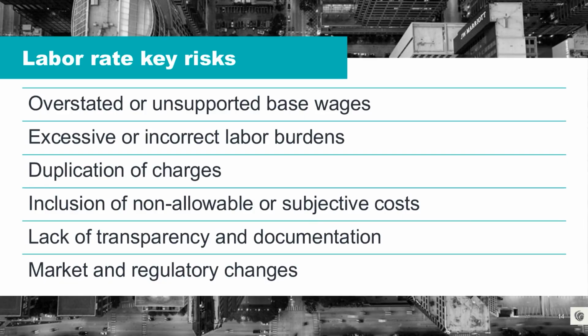So you're going to want to require payroll reporting to reconcile against proposed rates. And for multi-year projects, you're going to want to demand documentation for any rate increases, be it via promotion, merit, or cost of living.